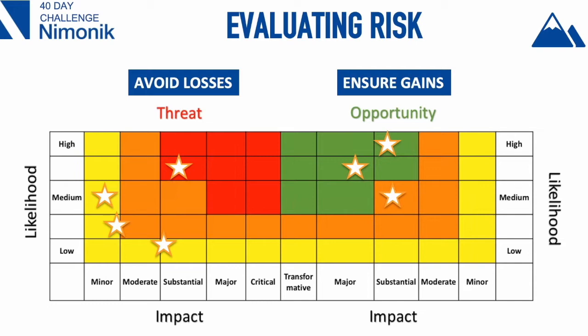And that's on the left-hand side, and that's about avoiding losses, and a lot of people have done that. If you look at most risk registers, that's probably what you're going to find: a likelihood and an impact statement, and you're going to multiply those two together, perhaps in a pseudo-quantitative way. Let's say it's not really quantitative. But what about the right-hand side?